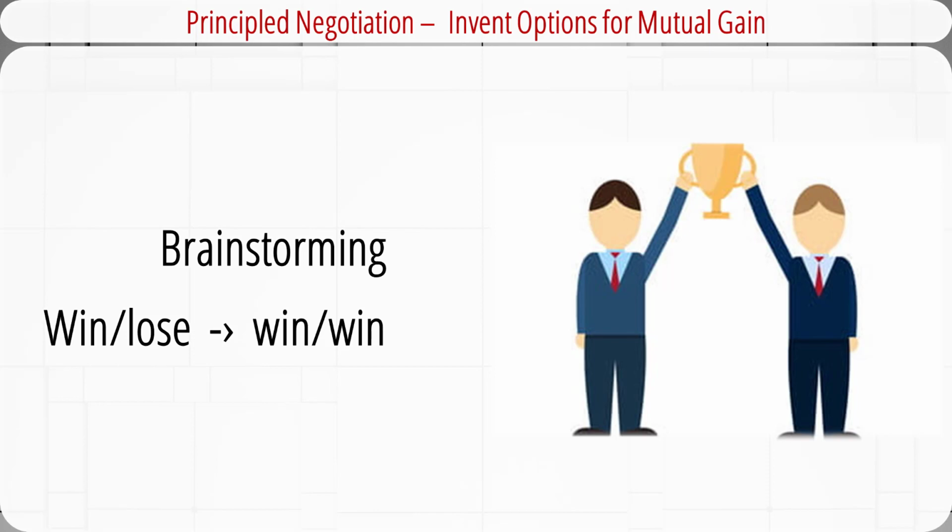This is only possible if each party knows what the other's needs are. The project manager may have learned from the discussion that the contractor was in a tight cash flow after purchasing a very expensive tool, and needing cash is a priority. During the brainstorming session, one of the options presented was to prepay for the order instead of the usual payment after delivery. Both parties found this option attractive and rapidly reached an agreement in which the project manager would pay the contractor for the entire job in advance, in exchange for a faster turnaround time and a significant price reduction.